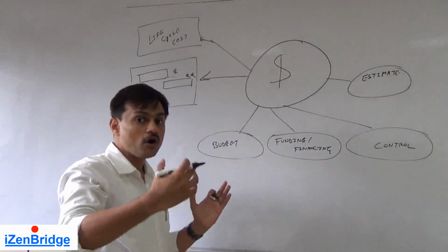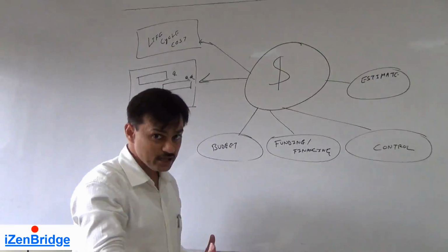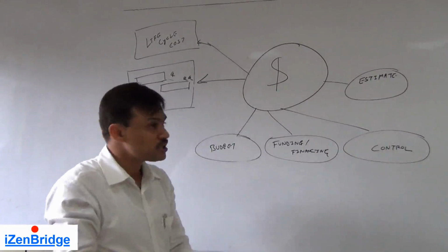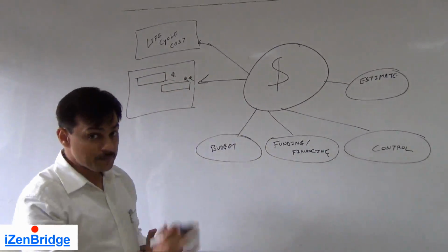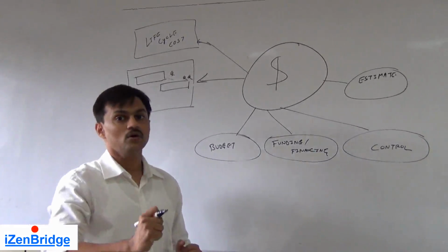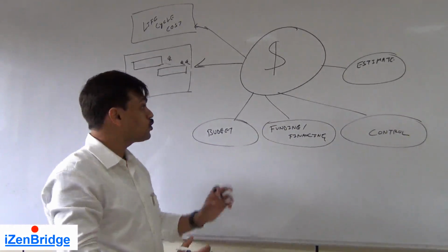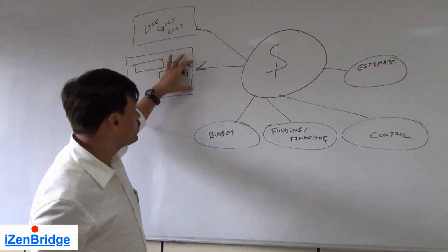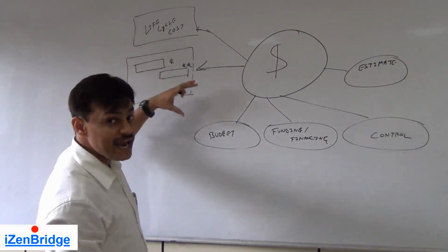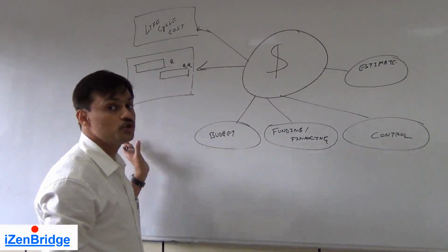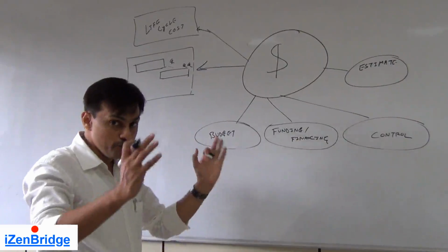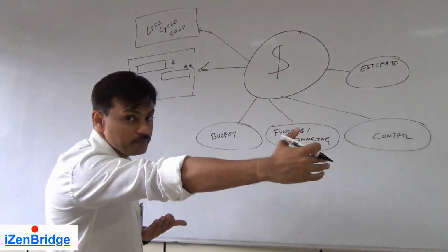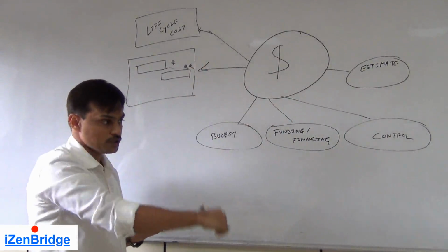For example, the cost associated with maintaining the code or supporting the given project output comes under project life cycle cost. Sometimes you may take cheaper design decisions to control your project cost. But if those design decisions are impacting your future cost, future warranty and maintenance cost, then those decisions should not be taken. The organization has to take a view on how they want to balance the project cost against the lifetime cost of a given project outcome.